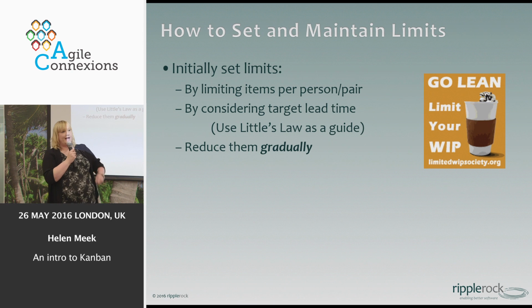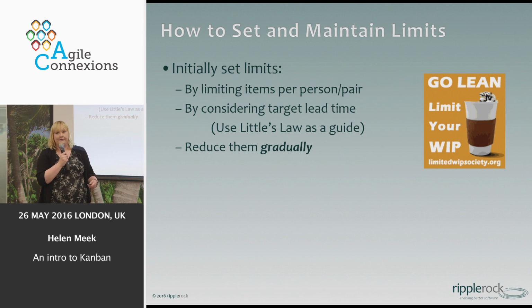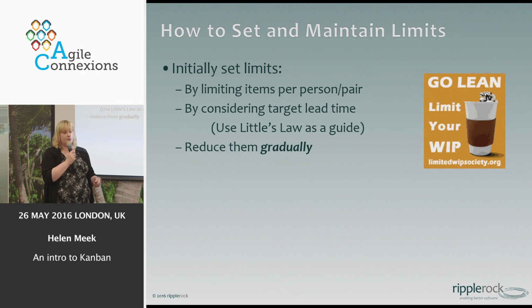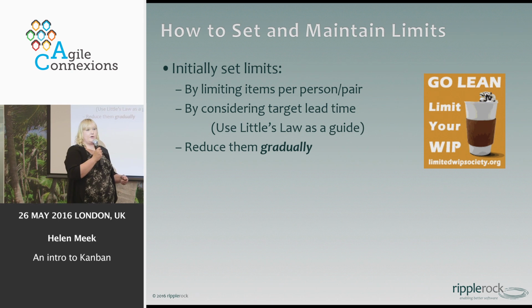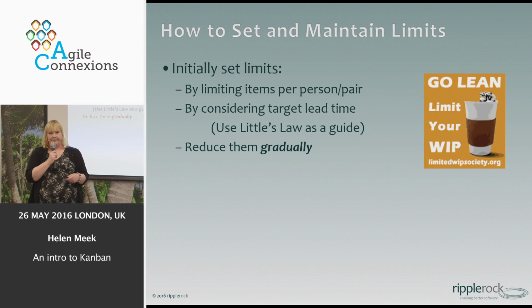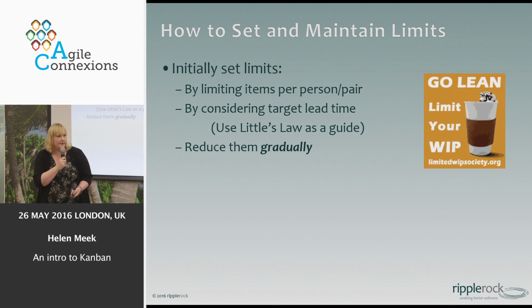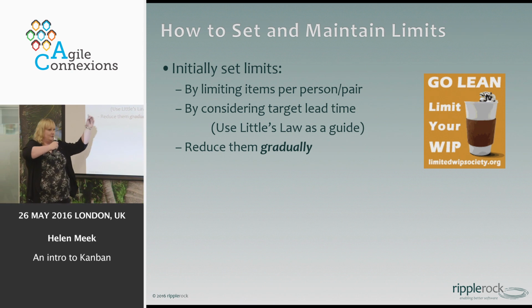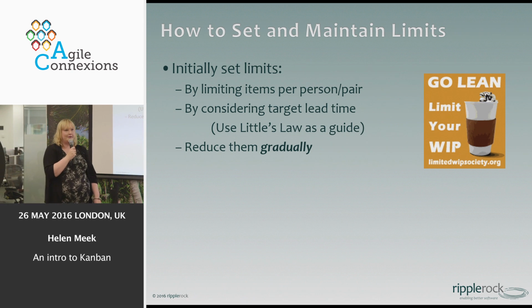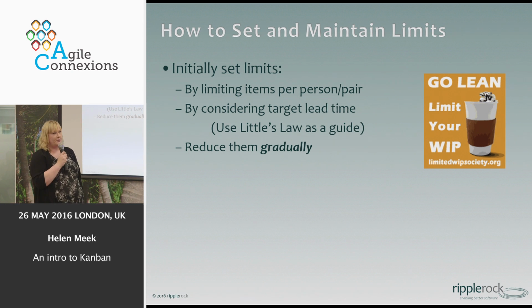But ultimately, as a person who's responsible for that Kanban team, I'm going to be trying to find out all of the different ways that I can stop waiting around for people to either respond to emails or answer the questions that I've got. Because quite often people are like, oh, this is really urgent, you have to do it now, and then they go away for 2 weeks on holiday and you have to wait around for it, and therefore it eats into your WIP limit and it costs you money because your lead time's getting bigger. Okay? So as a Kanban master, or whatever my job title happens to be, I'm going to be trying to find a way of solving that problem so my people aren't waiting and therefore I can reduce the WIP limits.